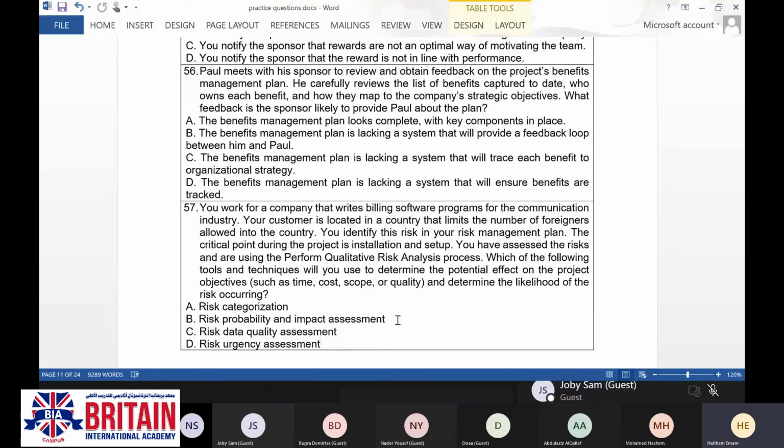The list of risks you will act on, you prioritize in descending order from the highest score to the lowest. But you have to pay attention to the urgency assessment: risks which will happen in the near future. You are going to rearrange your list to put even risks with lower scores at the top, so you take urgent action against these risks even before risks which have a high score.